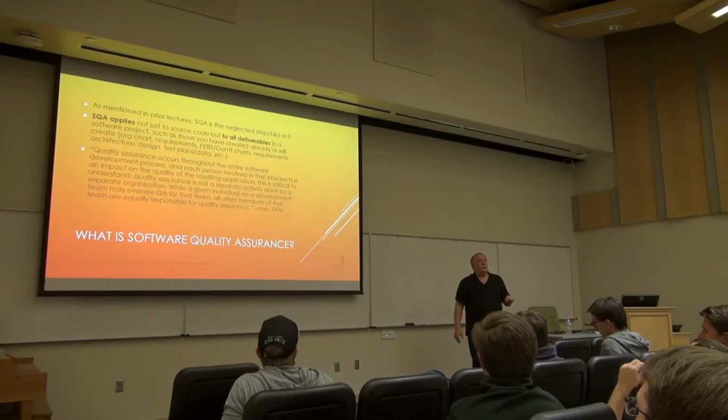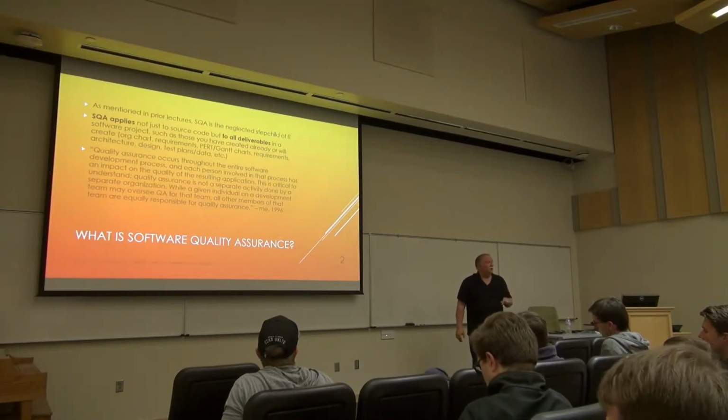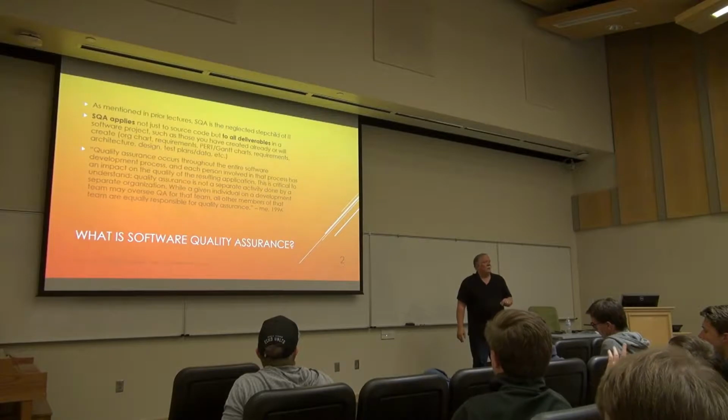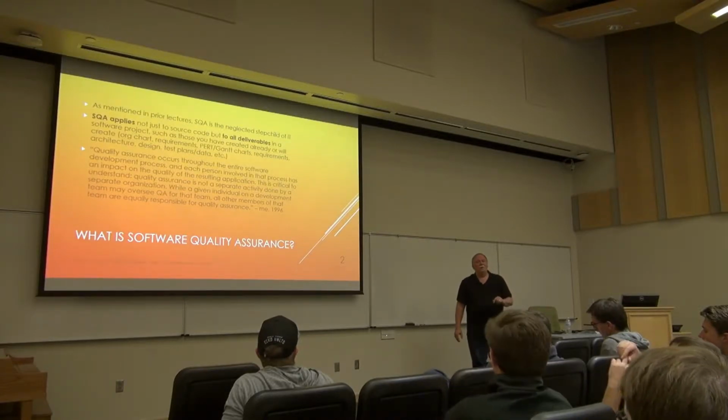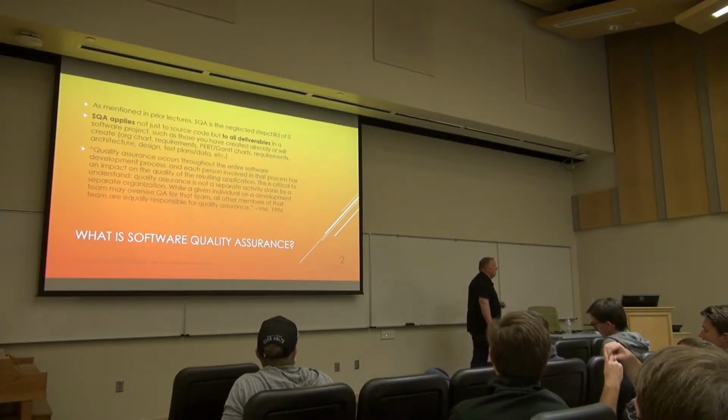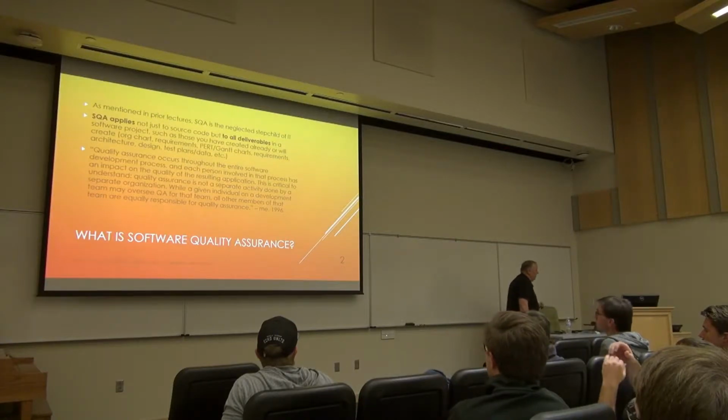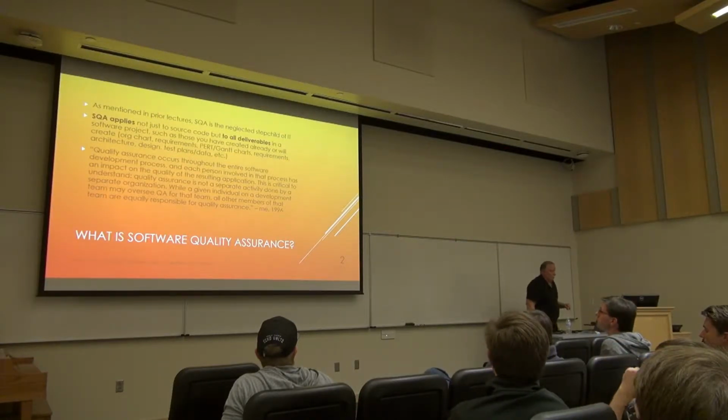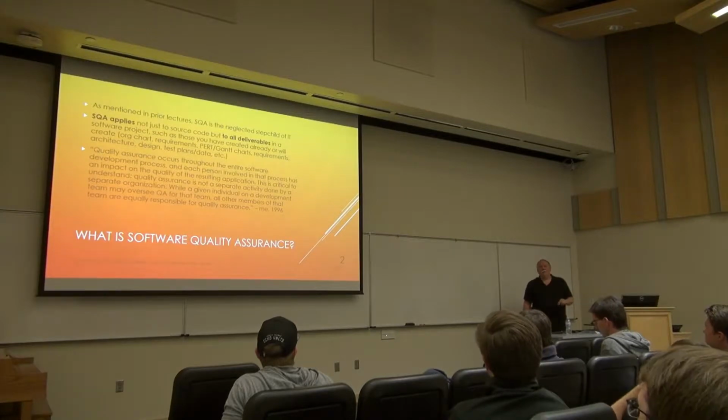It's all done later, and because you tend to defer the hard problems, you find all the hard problems showing up when you're trying to ship, and you either push it out there with the hard problem still intact, or you find yourself delayed for 6 months trying to fix them.